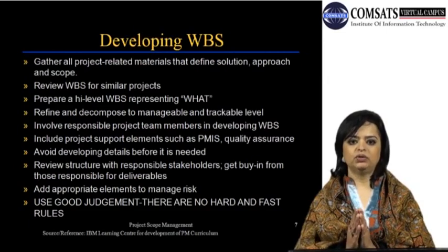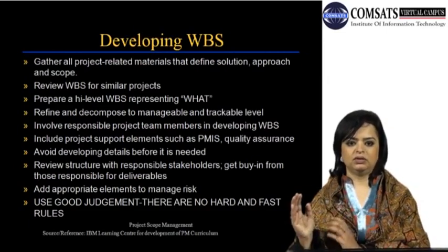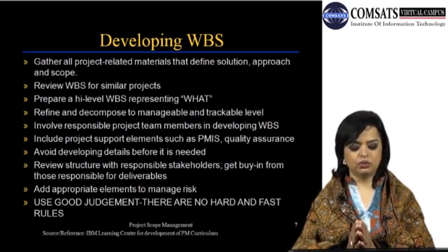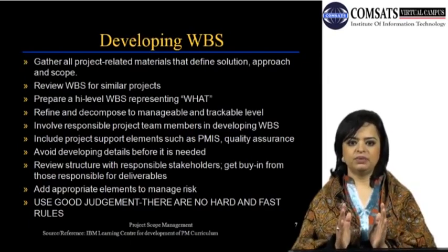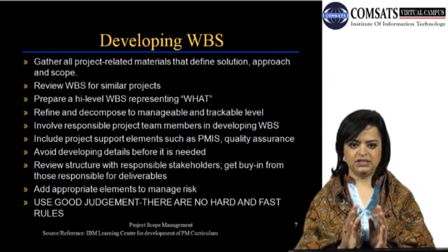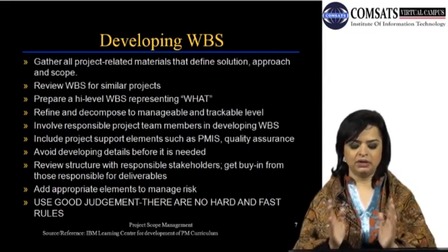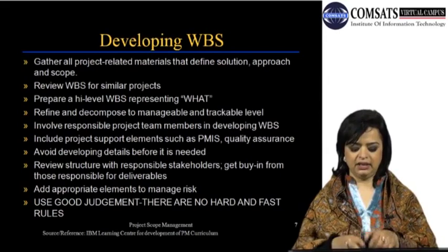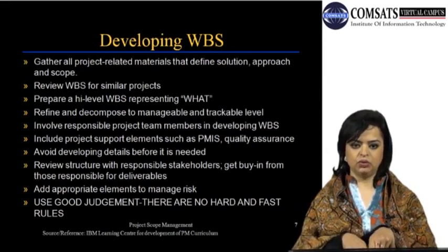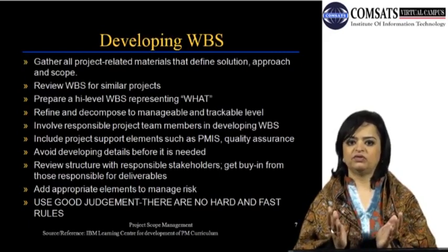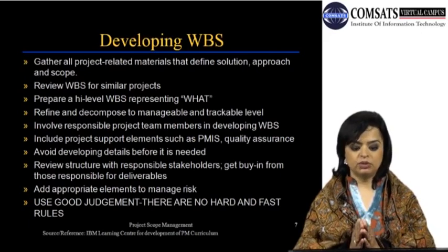Now when you have broken it down into the first level of groups, you will refine and decompose it to a manageable and trackable level. If the first step is to divide it by the initiation, the planning phases, or the phases of the project life cycle, that is fair. You start off with initiation, the planning, the execution, monitoring, control, and then the closure, and you start listing activities underneath it. Fair.